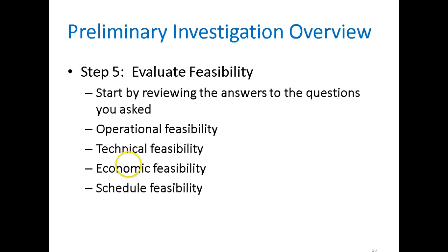Yep. And some processes in place that, even though it's a perfect system, if the factory can't produce the goods that supply our system that's ready to go, it's not going to be operational. If it's going to bring in, say, a whole new product, well, if we don't have anyone to buy that new product, we haven't talked to our customers, or say we're supplying a lot of products to Walmart, and we have one more. We haven't arranged for Walmart to make space for our new product on their shelves in a particular spot.